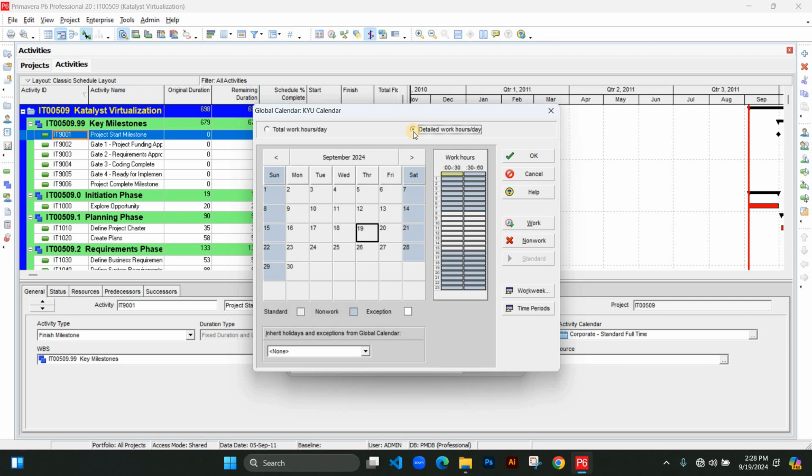You get? And there are 8 bars, each represents 1 hour. So for this, they are showing no lunch, like lunch break. But we can add a lunch break and say that non-working time, then you can extend from 4 to 5. Because this will be 4, then 4:30, 5. Each bar is 30 minutes. It's 24 hours.